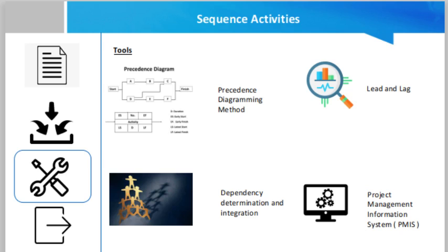So basically, friends, the precedence diagramming method is typically a graphical representation of the activity list and defines the order in which the tasks or subtasks need to be performed, often showcased as a simple flow chart with arrows depicting the dependencies of activities, rectangles representing activities, and the units of duration written above the nodes. This diagram sets the precedence for determining the dependency of activities. There are three kinds of dependencies: